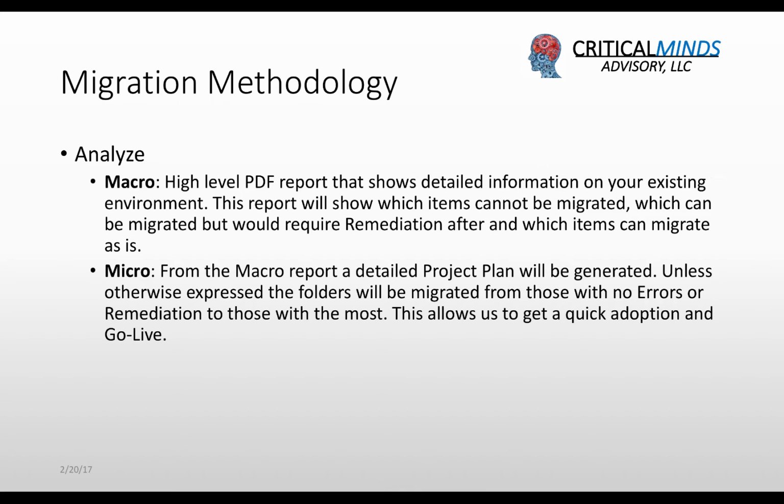From a micro level, you can actually develop a detailed project plan. Okay, this is the folder that should go first. This is how long it should take from the time that we migrate it to getting it into QA to get it to production. And then that way we can build a timeline and put this out and say, okay, starting on this date, we can end on this date and be in production, 100%, and feel very confident with that communication.